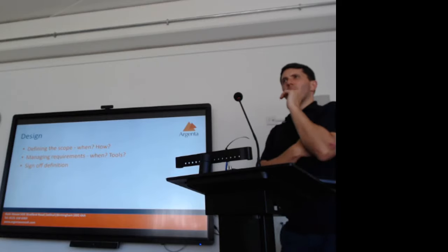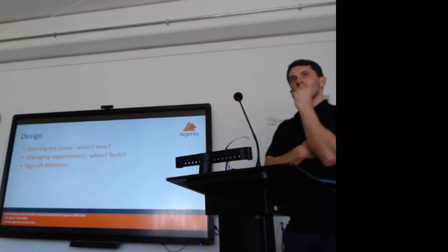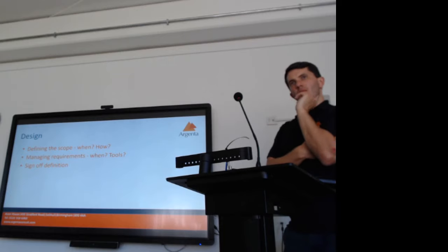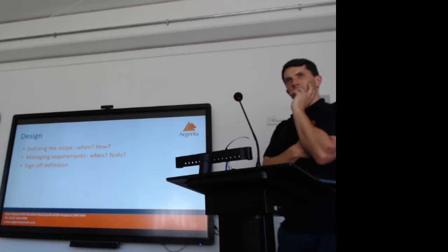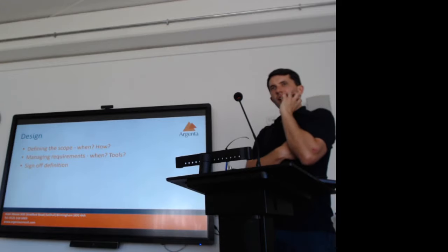Any other input on that one, with the design sign-off? We have a seven-stage process. The first two stages are about viability and listing requirements. At the end of the second stage, we sign off a requirements document, which might be quite detailed, and a spec doc will then be written. As you go through the design, the spec gets refined until around Tollgate 4, I think, where you sign off the spec, at which point the whole design is frozen, and then you're into the manufacturing part, and you shouldn't really be making any changes after that. So that's just how we try to do it.